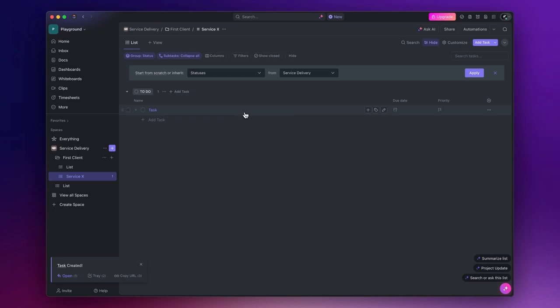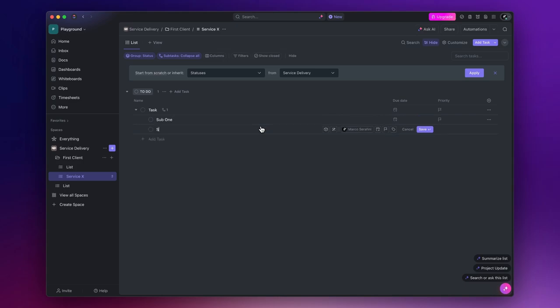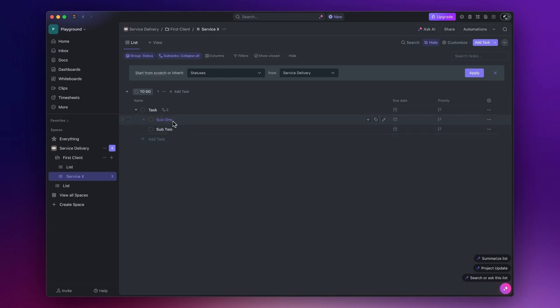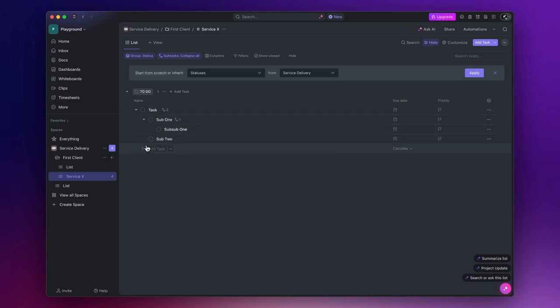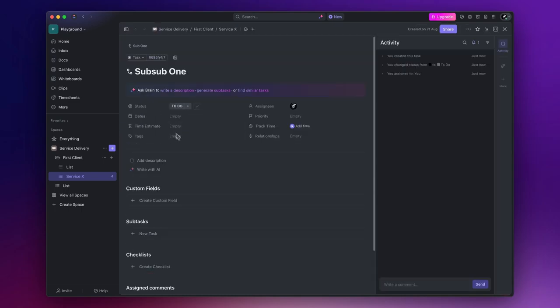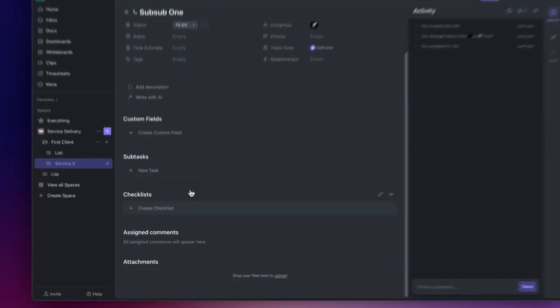Tasks can also be broken down into subtasks, allowing for more detailed tracking of specific actions related to the main task. ClickUp allows you to add up to seven levels of hierarchy to your subtasks, but whenever it's possible, I personally suggest using only the first level or the first two levels at most. If you need to keep track of other steps, you can easily do that using checklists found inside each task.